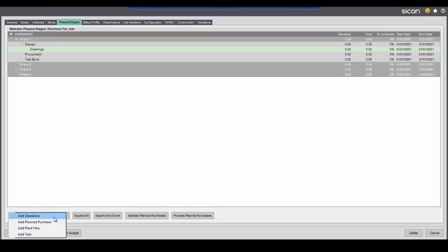So as I was mentioning, the operations are exactly the same as the operations in works orders. So they'll create demand for materials, they'll create demand for labour, so we can end up with a single capacity plan that's looking across the whole manufacturing piece. So for companies that have both bespoke project work and standard bill of material based works order production, then it's ideal to see that in a single place. So every operation in here will appear on that capacity plan on the schedulers as well.